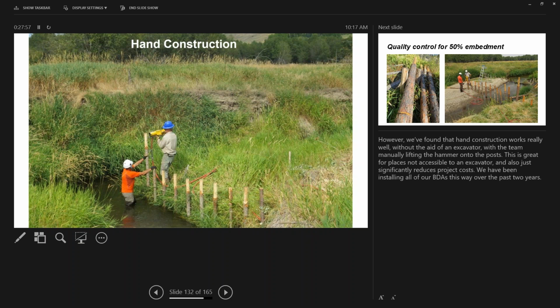How much does the pounder weigh? This is a pneumatic post pounder, and so it weighs about 65 pounds. The hydraulic pounder that we experimented with this year for one day was extraordinarily more heavy, because when you look at the specs on the website, they tell you how heavy the pounder is, but they don't say you have to add all these other attachments that make it even heavier. And then you've got the hose that's filled with fluid, which is also heavy. It's like orders of magnitude more heavy and difficult, we found, in our situation.